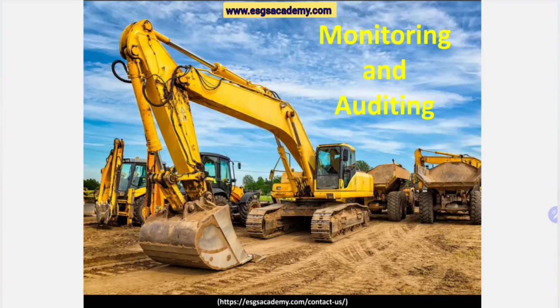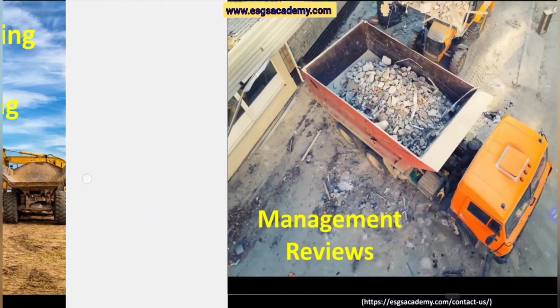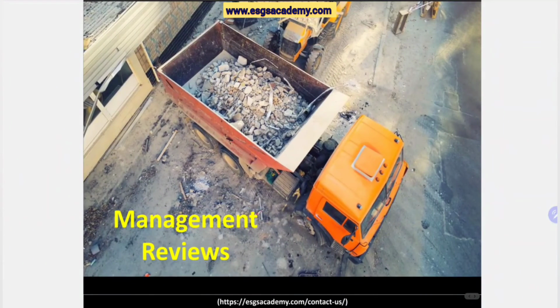Then there are certain reporting requirements related to the performance monitoring for environmental management, where we can consider the incident reports, the periodic or quarterly performance reports, monitoring compliance and audit reports, environmental checklists, procedures to review inspections, and steps to address the non-compliances for monitoring and auditing actually. Then finally we have management reviews, where the top management is involved in identifying the requirements and overseeing the requirements of the environmental management during the construction phase, and to review the performance of environmental management during the construction.